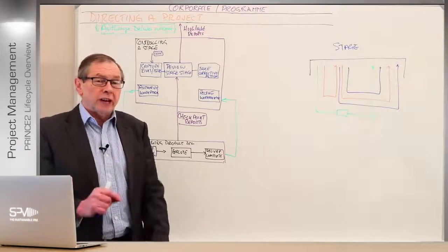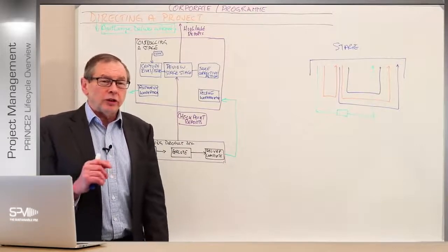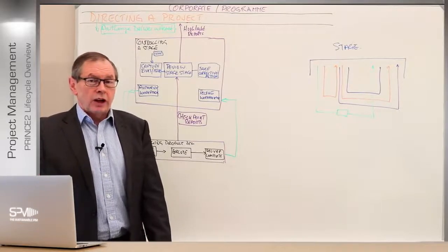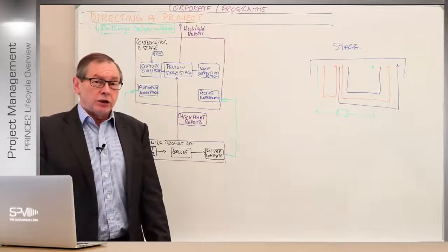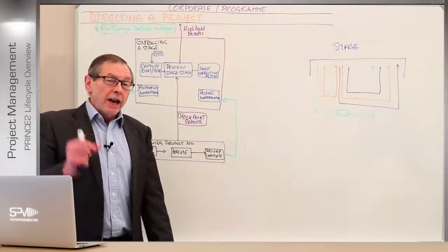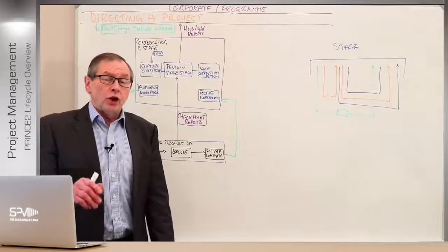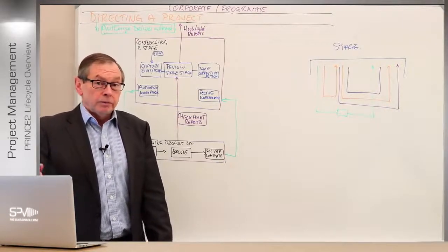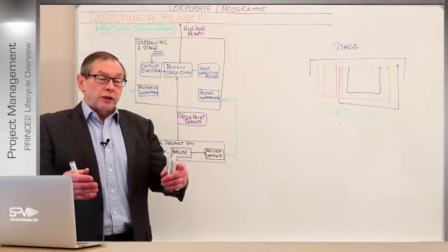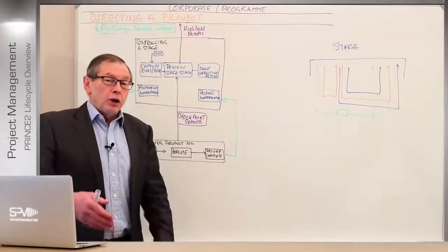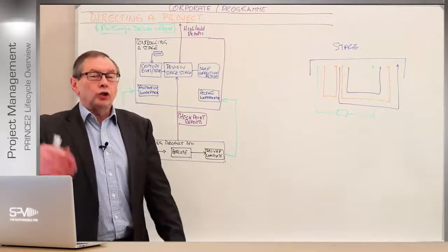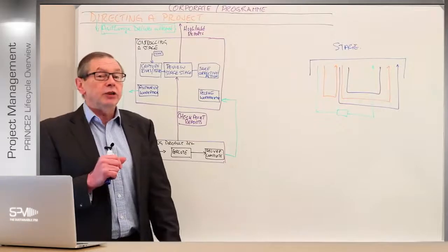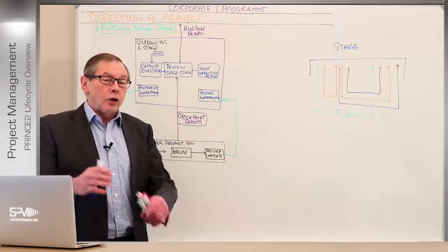Now, this is very important to understand. Tolerances are not there to say you've got a week's grace on top of the project or that stage or that work package. What it's saying is, if it looks like you're forecasting to go beyond our level of comfort that we leave you in control with, then, for example, if I've got a 6-week stage, but it forecasts to go beyond 7 weeks, we need to step in. It's out of your control in some respects.